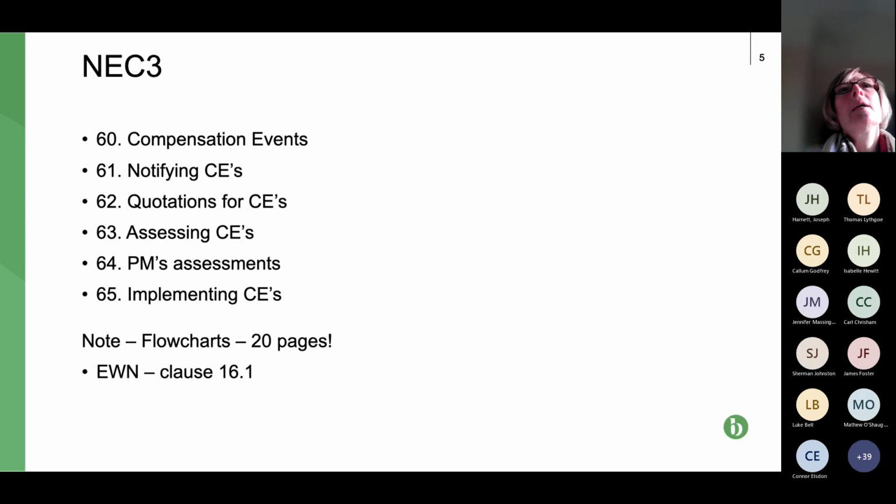What I would say is when you start to think about notifying a compensation event, I think it's really good practice to always look at that list in section 60 and also the X clauses, because sometimes you'll find that actually you might have thought it was the CE under one provision, but if you continue looking down the list, you might find other CEs that are relevant. That's all I'm going to say about clause 60.